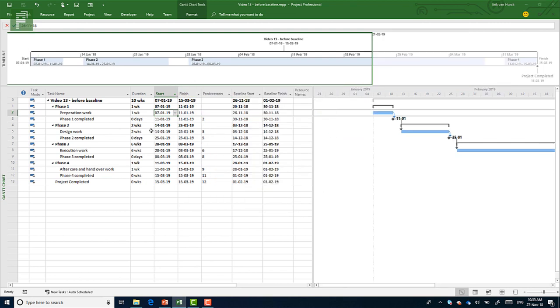Now my current forecast or schedule or actual schedule is set here in the start and finish date. And the baseline start and the baseline finished are still in November, which is exactly what I wanted, right?